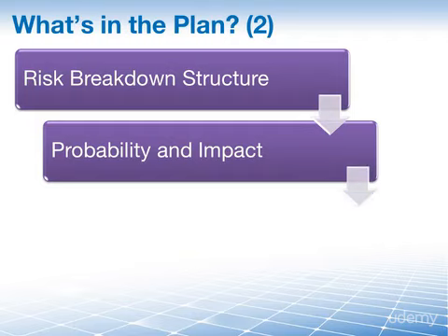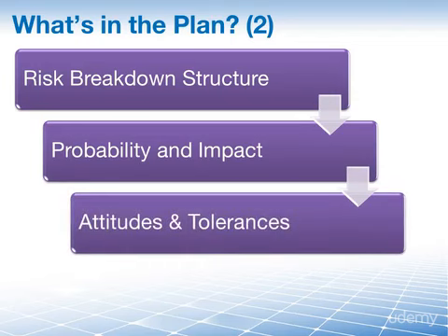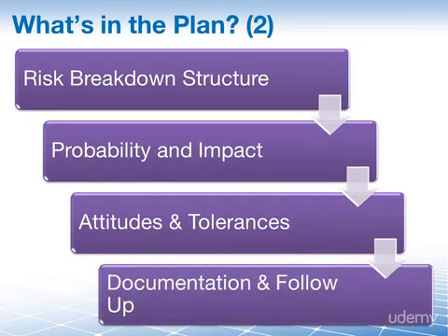Then the risk management plan also contains information about the stakeholder risk attitudes and risk tolerances. After all, your risk tolerance is different from activity to activity, and for stakeholders it's the same from project to project. We have two more items in the plan, and they are the reporting formats that define how we document and report information about risks, and finally the tracking, which documents how we will be documenting our risk management activities so that we can use this in the future lessons learned.